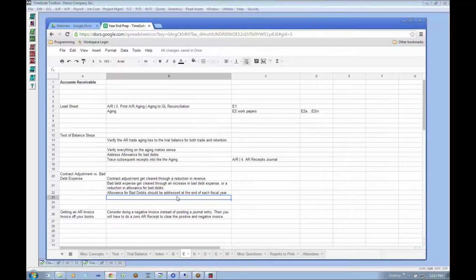So there are different criteria you should follow in getting your change orders on your books, and those criteria are fairly well defined in the generally accepted accounting principles world. Basically, if it's probable that you're going to be able to collect, if it's recurring, you have an existing relationship, and you always get the change orders based on the normalized process, then you're allowed to put it on your books. If it's something that's questionable, if it's not probable, or maybe we should use the words highly probable, then it becomes something where you might want to factor it down to what is probable.